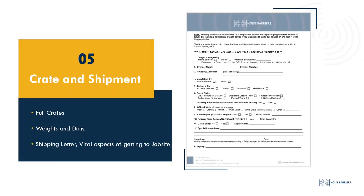When everything is crated and ready to ship, your project manager will have sent a shipping letter asking for truck style, tracking requirements, dock door availability, crane or fork truck on site, address, and who's providing installation. This document tells us everything we need to set up the freight for the load. The sooner we have it, the more ahead of time we are in scheduling and getting the best rate possible. If freight is being handled by the customer, we can send weights and dimensions so the customer can coordinate the pickup and delivery.